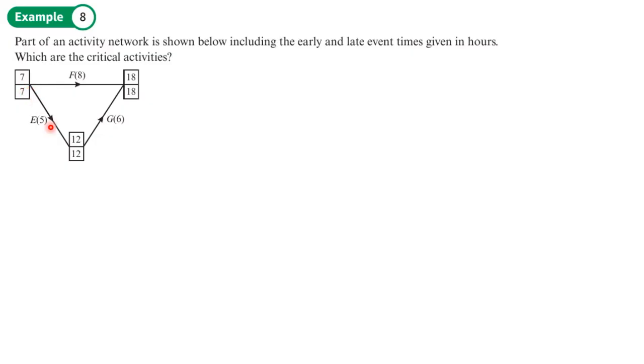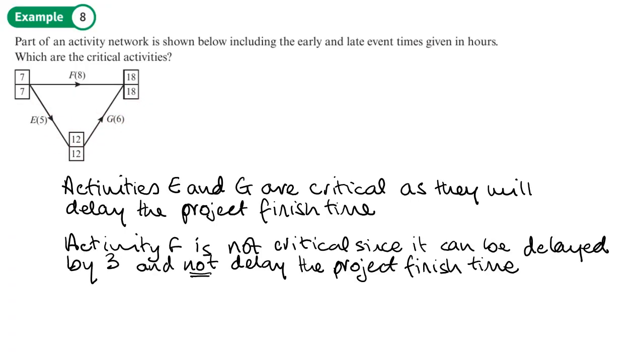However, E being delayed will delay this and G being delayed will delay this. And notice seven plus five is 12, 12 plus six is 18. So activities E and G are critical as they will delay the project finish time. We just look at the values in these boxes here to tell us that and the differences between them. Whereas activity F is not critical since it can be delayed by three and not delay the project finish time.